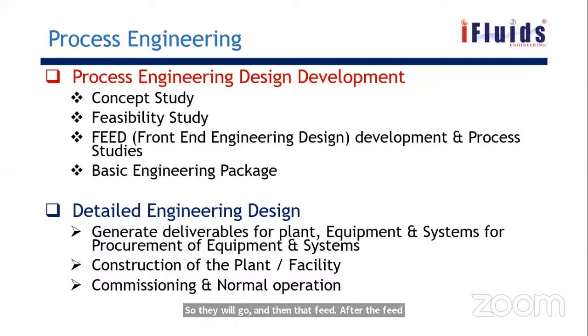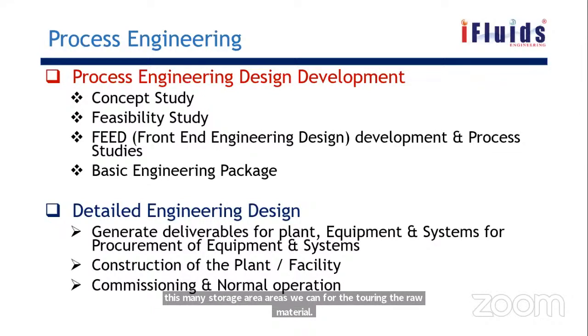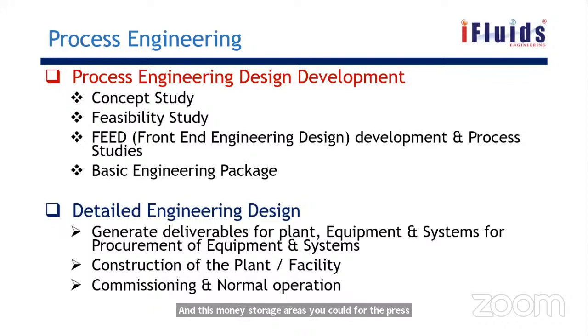They will come to know how much area is required for putting the plant, how much metal is required, how much water is required for the plant, how many storage areas are required for storing the raw material and for storing the products, and they will give the overall estimate. For putting the refinery in Madhya Pradesh, we need 50,000 crores like that. And there will be huge equipments involved, so they will also get an estimate including all.